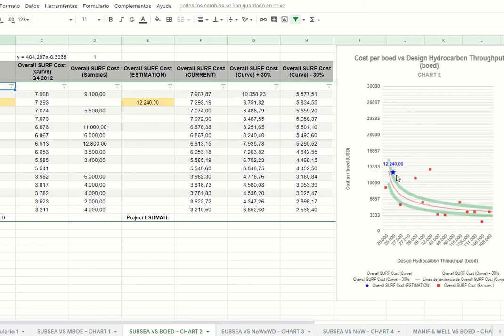If the spot is far from this green area, probably depending on the deviation, we can define the yellow traffic light, and if it is too much far away, it's red. It means that you have to correct, you have to fix your estimate. In this case, you are okay. Okay, let's go.